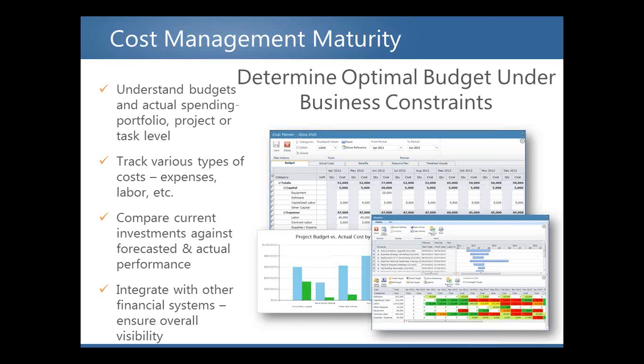If your organization isn't prepared to exercise cost management at the task or work level, don't. Start where you are now and then mature the processes as you adopt the tool. A system that houses partial data can lead to poor decision making. So how will you know what decisions are necessary when you don't have the visibility to see where you currently are with your costs? So this one's critical. If you're not doing costs today, again, transfer the processes that are being used, and then gradually mature so that you're able to see the overall cost across your portfolio.